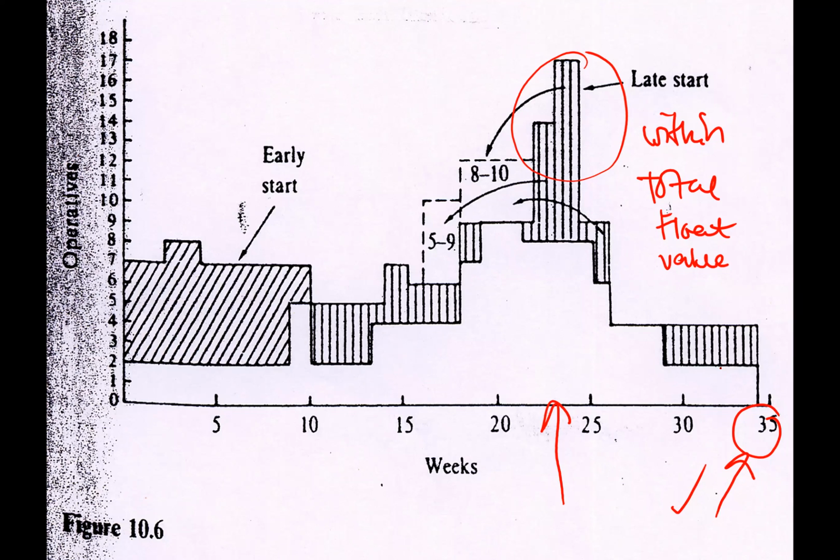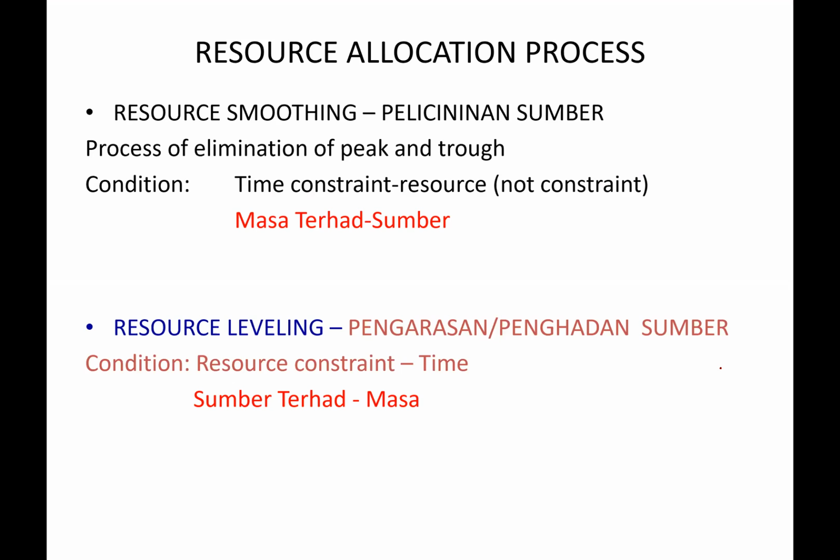That is what we call good scheduling. Good scheduling should always have that in mind. You do not just simply want to squeeze everything within the contract period that the client gave, but at the same time, you also want to maximize your profit by optimizing the resource usage. Having scheduling software as a tool can help you to see all those things, because everything that you input will be generated into many forms, such as resource histogram, resource graph, or resource usage. You can see all those values.